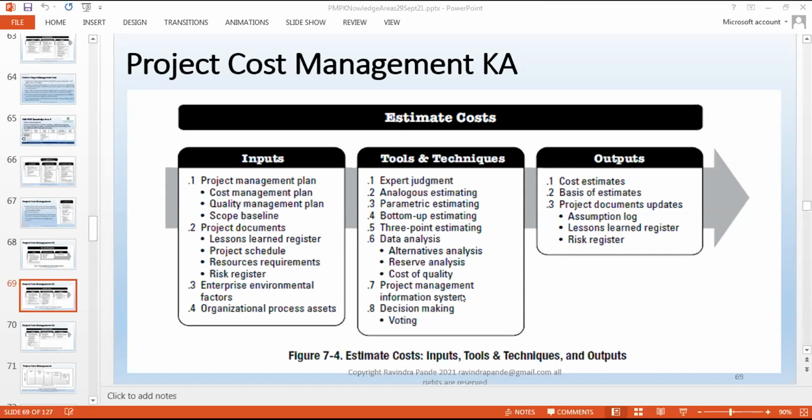These four estimations, which are mentioned in the PM book, are normally the standard ones used by older project managers. But now we use certain more real, practical estimations, like lines of code a developer writes at an industry level for .NET or Java, how many pen modules a machine or robot can make in a day, how many cars we can get assembled in a day, and so on and so forth. So now we look at more practical estimations as of today, because we have those historical figures to support us in those scenarios.